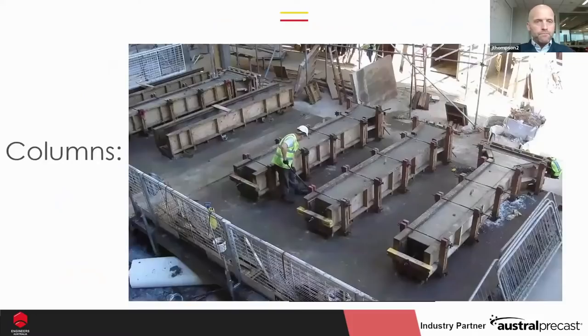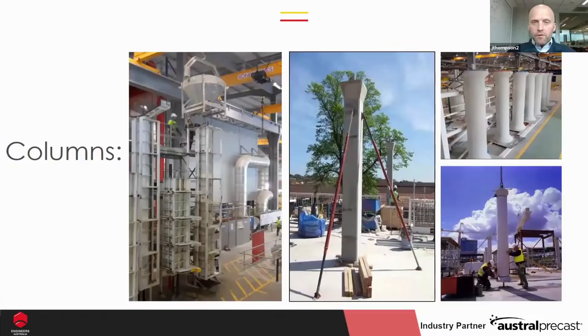Columns, I always laugh at this one because when I joined Laing O'Rourke in 2006, this is one of the first things I saw. A gentleman called Mick Joblin, who was and still is so far ahead of the curve, did off-site manufacturing on-site. So that was what we did in the early days, take columns off the critical path, manufacture them in advance, and just land them where they needed to be. Most of the time now, we opt for the off-site option, and quite right too.